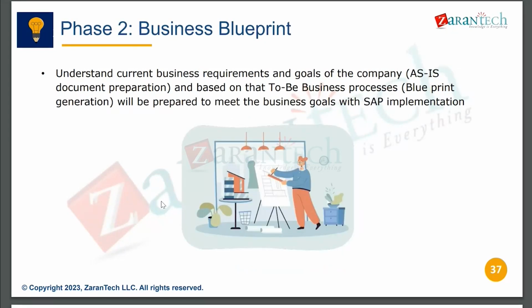So business blueprint, understanding the current business requirements and goals of the company. As-is document preparation and to-be document preparation will be done, which is presented to the business, and based on the acceptance and sign off from the business, then the implementation phase will start.